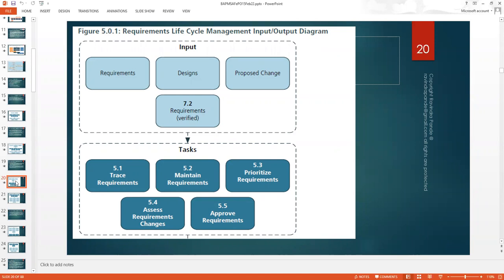In these weekly review calls, we talk to the clients on change priority, change requirements, and how the approvals are going to be affected. Do we need the approval of a product owner, or can a normal HR executive who is in charge of some department also approve those things? So these things do happen. Whenever you build this business analyst approach, you normally mention the approver name and designation for a certain department as well. And this way we create this document. Here the most important documents are the RTM, requirement traceability matrix, the list of requirements and the list of stakeholders. So we have created these three distinct documents as output, or those are the documents which get created in this business analysis process.